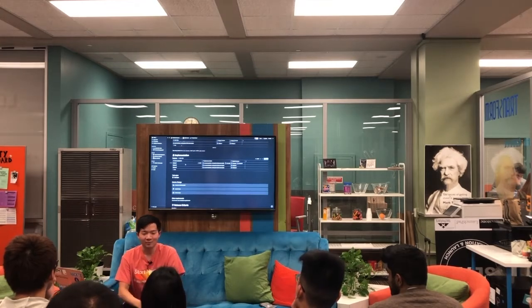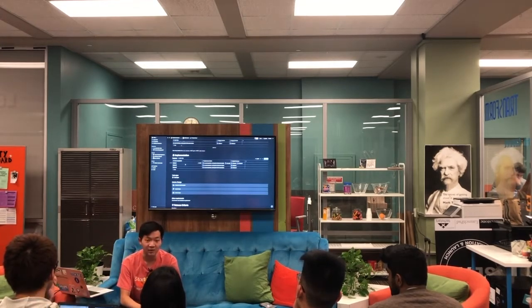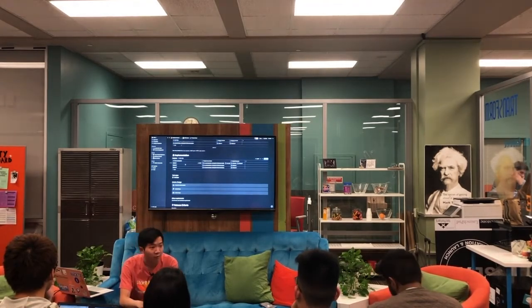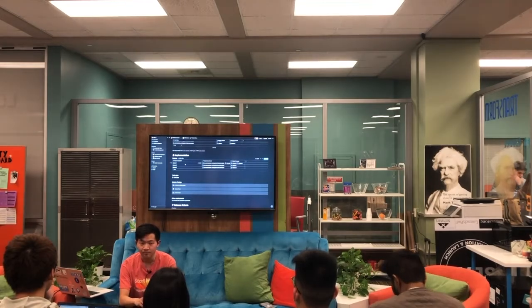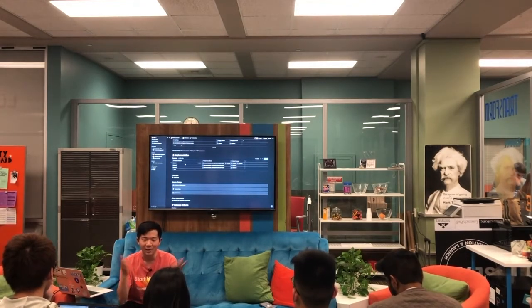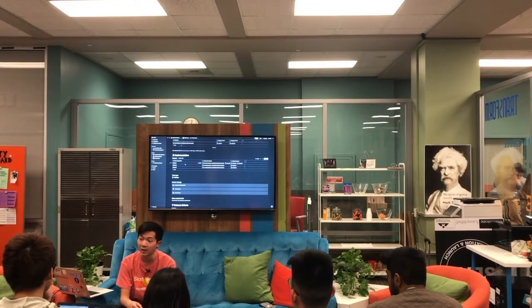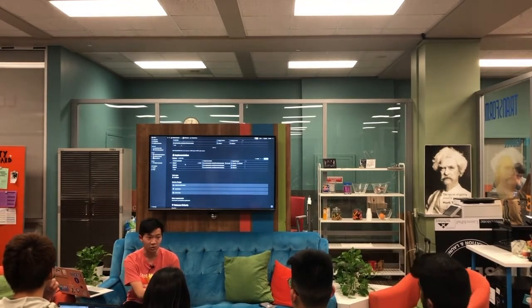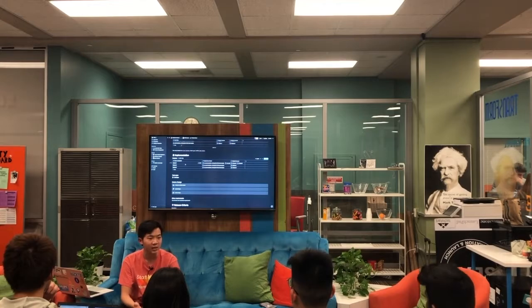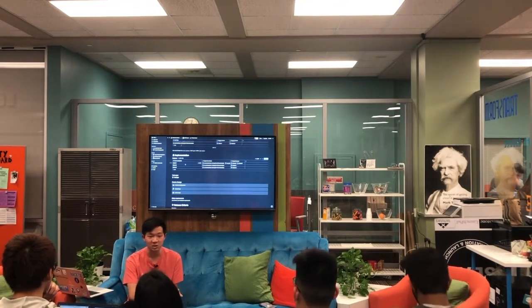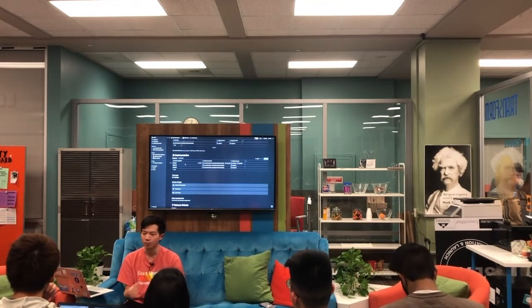Really break down everything that you think you want to build. Individual features are login, sign up, a profile page maybe. Say like the entrepreneurship platform, right? Where we're connecting student startups with technical talent. Profile pages for the students, profile pages for the startups, maybe a messaging system, right? And then break it down from there.